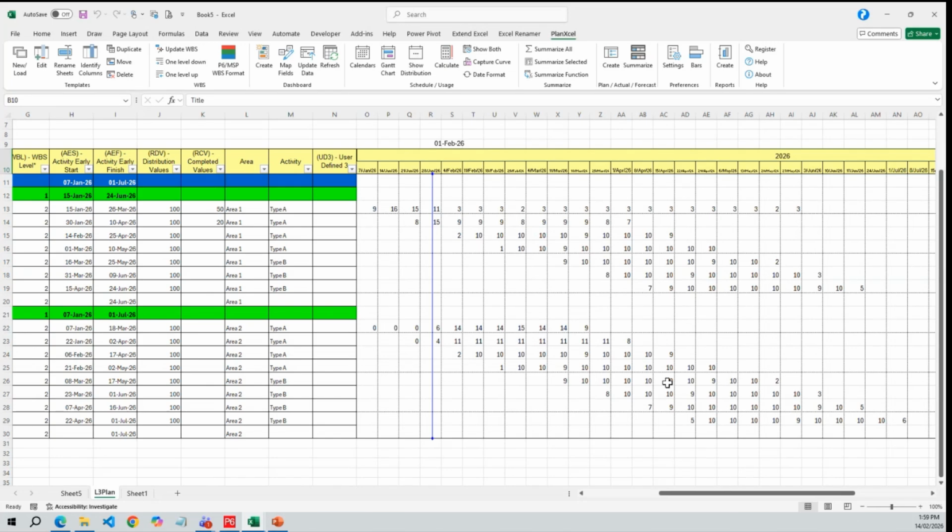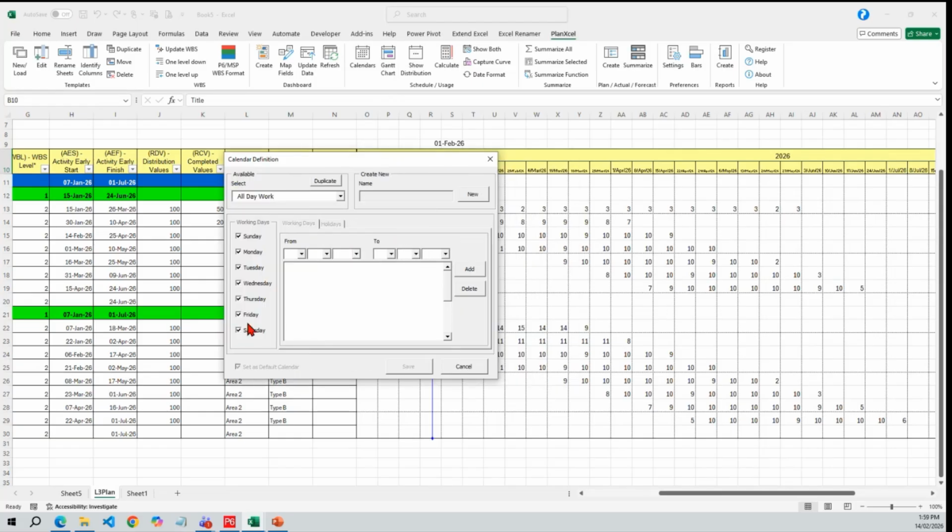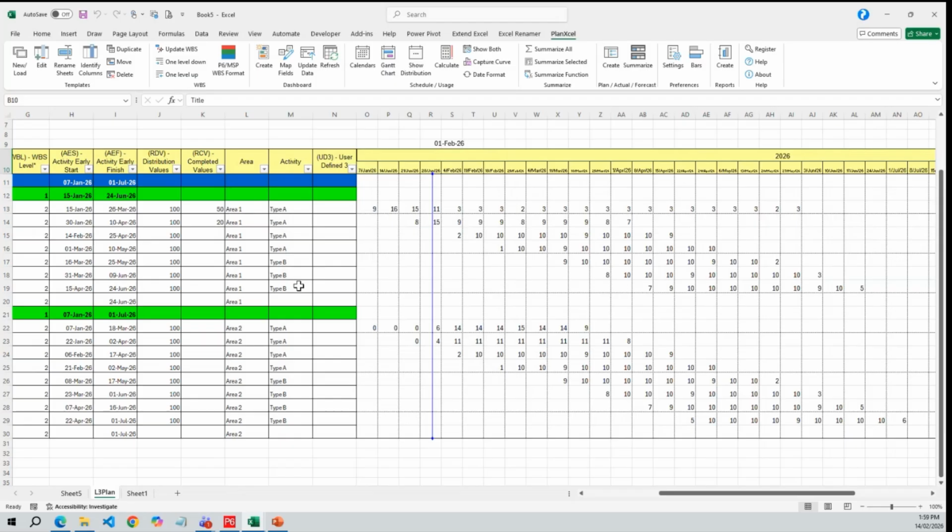be modified. And then if you want to have more insights on the week itself, for example, in the week, we are not working all the days. So if you want to go for a daily target, or if the week is only 5 days, then that also can be done using the calendars. You can define multiple calendars. You can define which are the holidays and working days. And based on that, the whole thing will again reach a forecast based on the available working days.